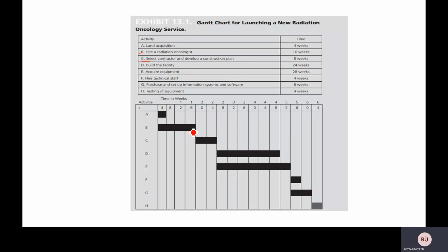Dependency relationships exist among the activities. Some activities cannot start until after others are finished. Yet certain activities can be carried out in parallel with others. For example, activity D and activity E can be carried out during the same time frame.